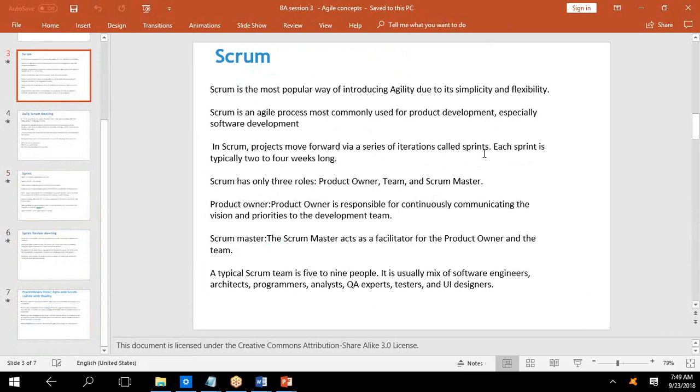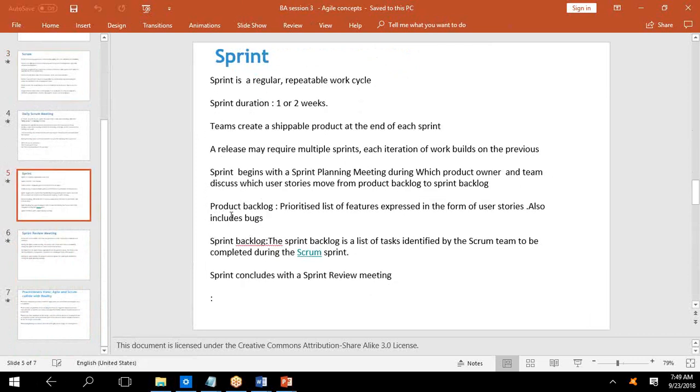So, coming back to your question. Product backlog has 100 features. In sprint, they're just going to pick up a few of them first. You will pick only a handful of them, 5 or 6 in total. Maybe at most the number of features you can do in 1 or 2 weeks may not be more than 5 or 6.